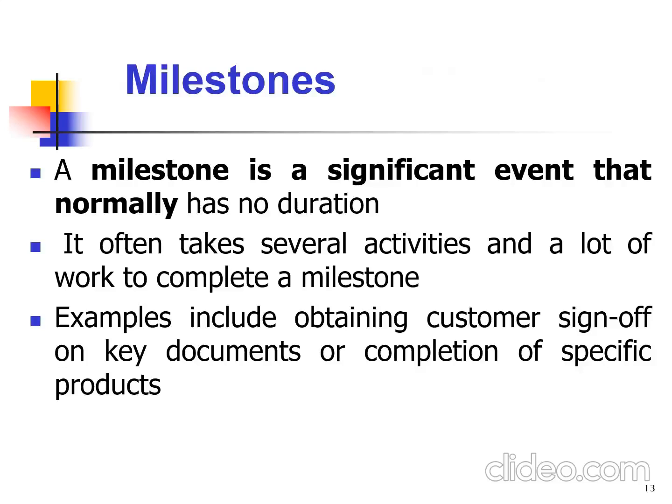We have milestones. A milestone is a significant event that normally has no duration. It often takes several activities and a lot of work to complete a milestone. Examples include obtaining customer sign-off on the key documents or completion of a specific product.